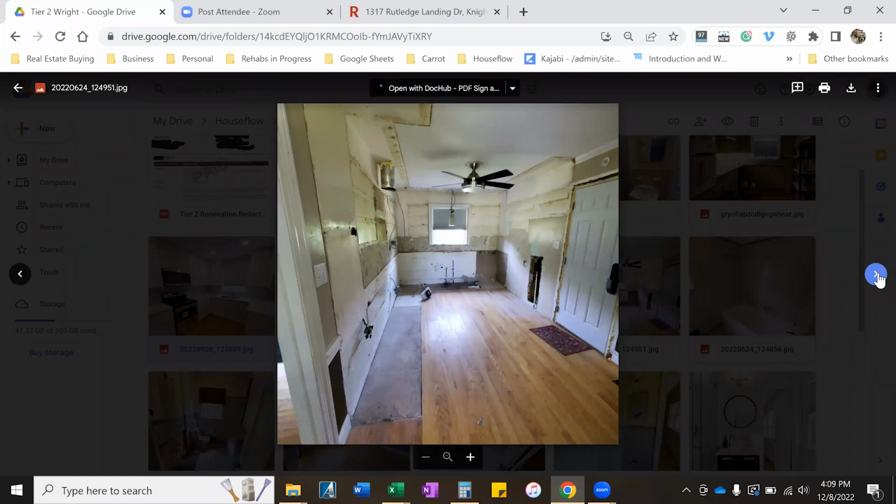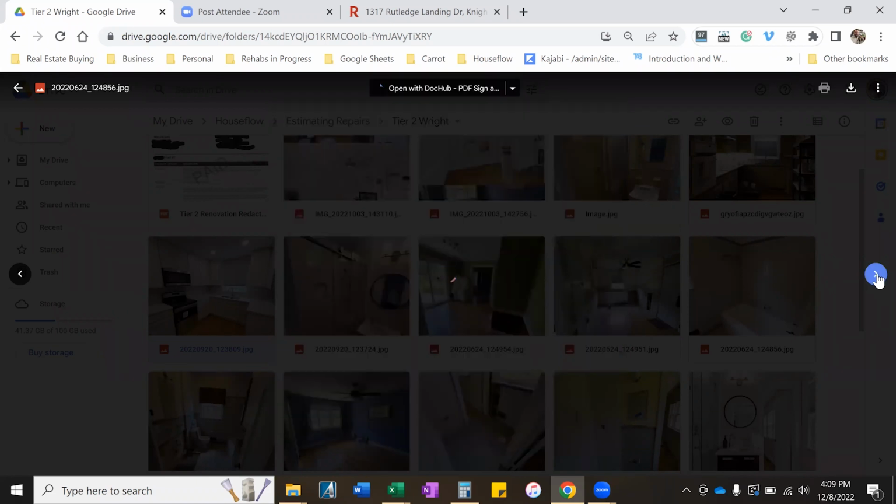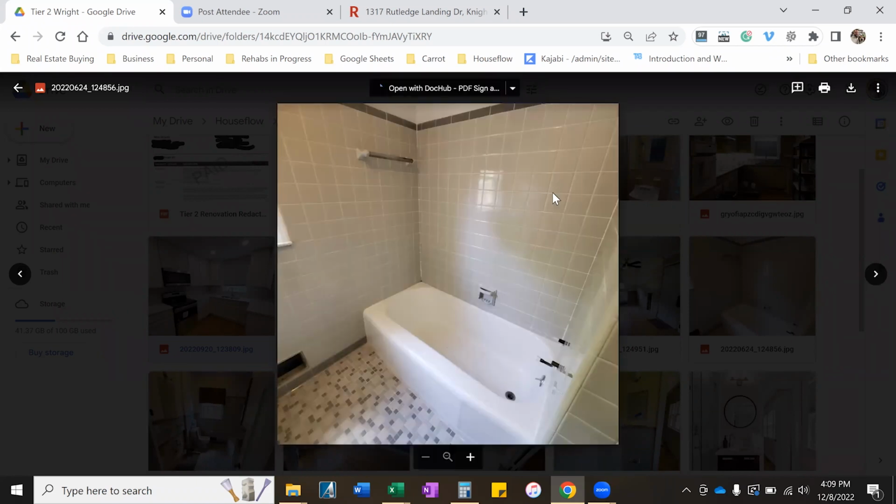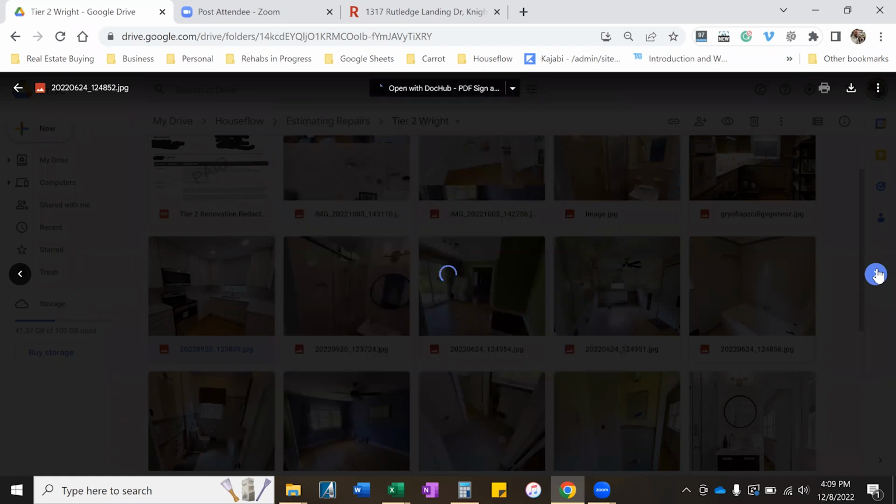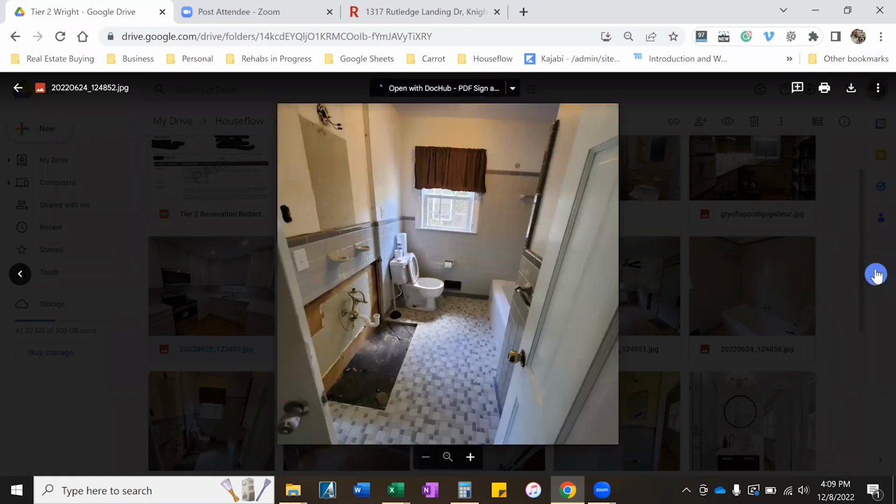So you usually have to have those 30-yard dumpsters out front. So you have a demo. You have to order the new cabinets, have them delivered, assemble them, install them, hang them. Then you start with the rough-ins and the trim outs. And this is where the cost starts to increase. We didn't do that much to this section in here, but we had to demo that vanity.